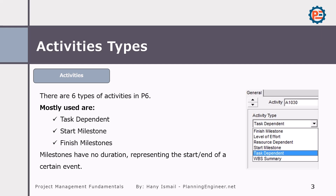There are six types of activities in Primavera P6, but I'm going to discuss only the most used ones. We have task dependent, start milestones, and finish milestones. If you are wondering what milestones are, milestones have no duration — they represent the start or end of a certain event. I'll explain in detail.